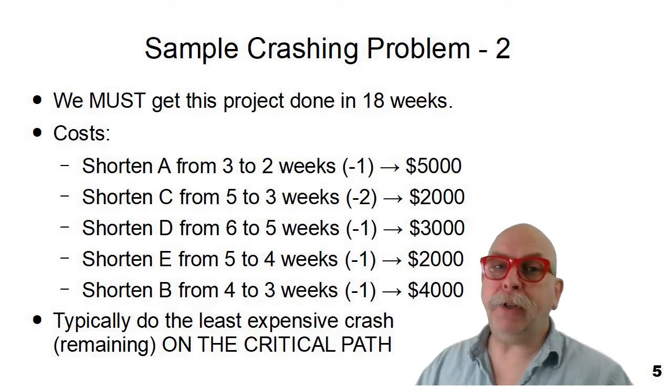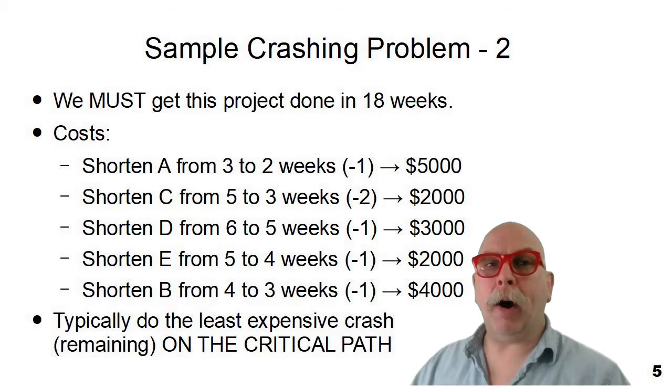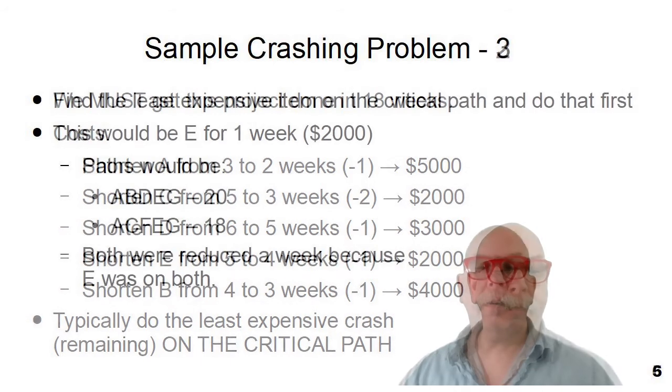Remembering that as you go through the process of crashing, as you shorten a task on the critical path, that path may no longer be critical anymore, and another path may become critical, which is why I always lay out a full network diagram and all of the paths as I'm going through the crashing. Let's see that in action.